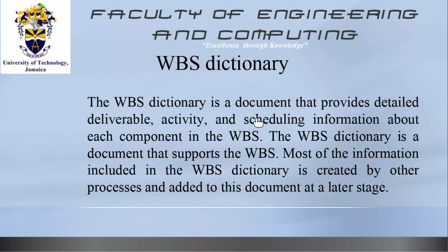The backhoe needs to load the truck. The truck is going to charge this. I am at a stage where I know precisely what is required, and I have 5 activities in this work package. All 5 of them, I can cost them, and I can put some time into it. That means I am working in the WBS dictionary, because I'm assigning duration, I am assigning cost, and I'm assigning resources. So the WBS dictionary is a document that supports the WBS.